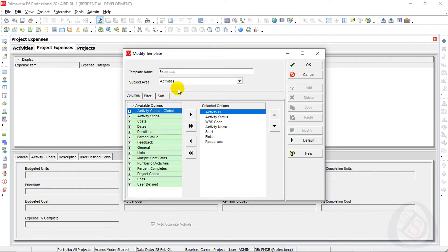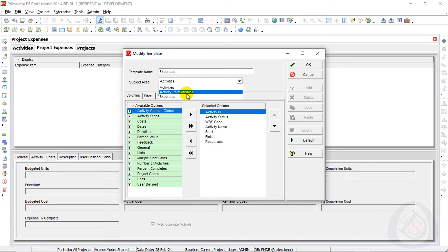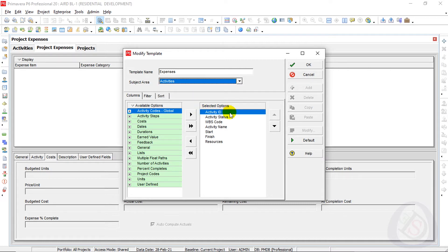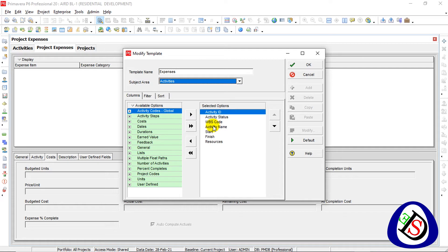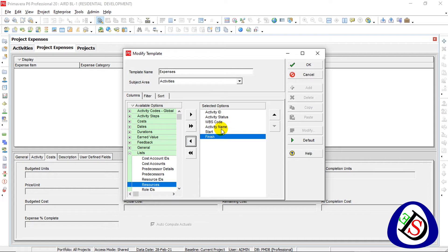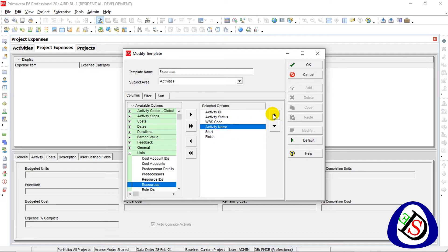When I type 'Expenses,' I have three character areas: first Activities, second Activity Relationships, and third Expenses. For Activities, I need Activity ID, Activity Status, WBS Code, Activity Name, Start, and Finish. I will remove Resources since I don't have any assigned, and I'll move Activity Name to the third position for better navigation.